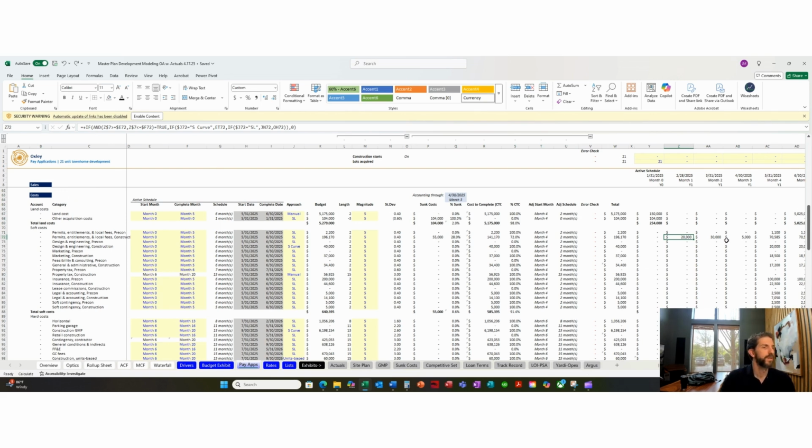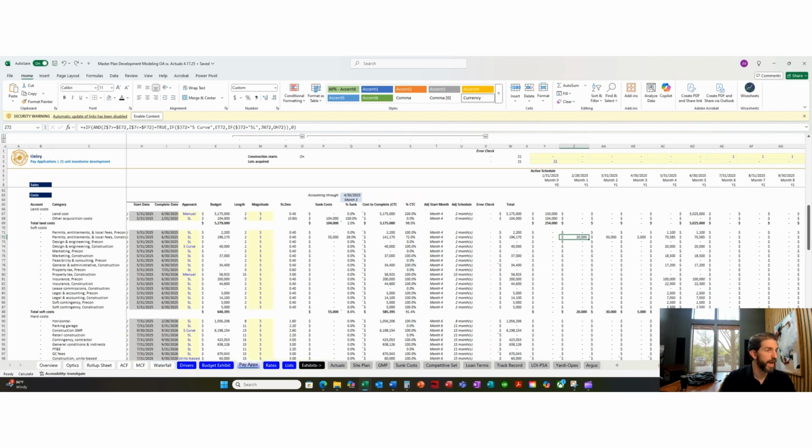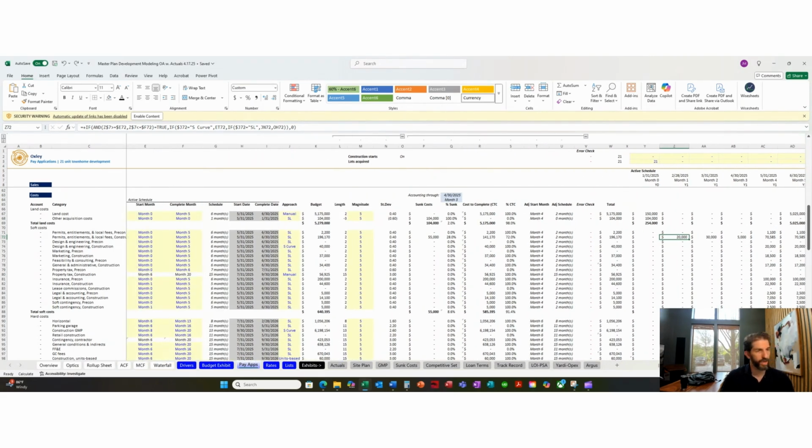We're going to know whether we're on budget or not, and total dollars is relevant, but also the timing you spend money as well. If you spend it too early, your lender might force you to rebalance the loan and put more equity in because your percentage of completion doesn't match your spending. But anyways, where I was really going was the fact that we plug actuals into our model, and it'll reforecast the future based on the present and past.